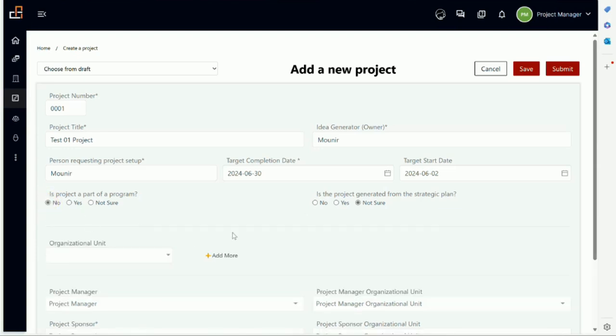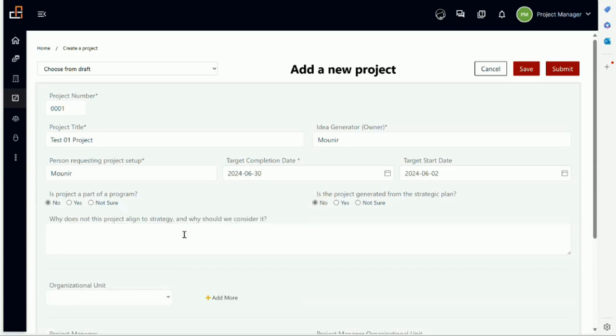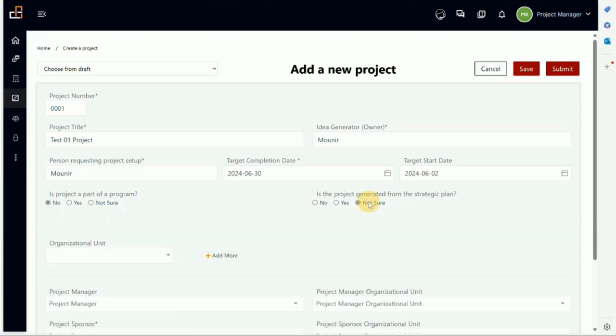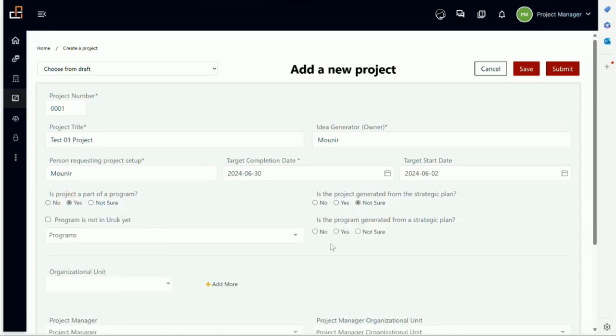Is this project generated from the strategic plan? Not sure, yes, or no. If no, it will tell you why doesn't it align and why should we consider it—this is part of governance. If it is yes, then how does it align? We don't want just yes, we want an explanation. Of course, if it is not sure, it doesn't give you anything. If it's part of a program, it will ask you if it is part of the strategic plan.